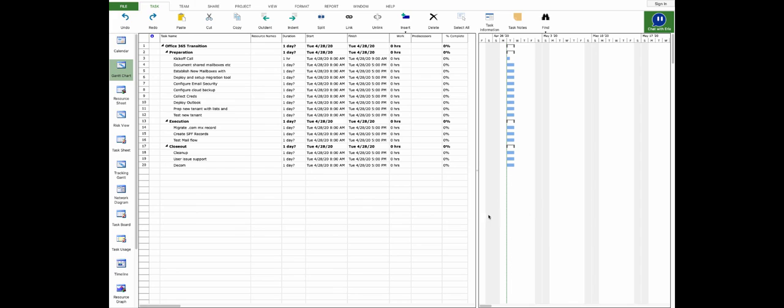So once we're on our kickoff call, we'll typically identify a few key items here, specifically, when we would like to do our migration. Changing this date will help dictate a critical path in our project, as the migration of the record is sensitive to a lot of the tasks that are in preparation. So for demonstration purposes here, let's pick a day, let's say May 20th for our cutover. This is a task that's going to take us a couple hours.